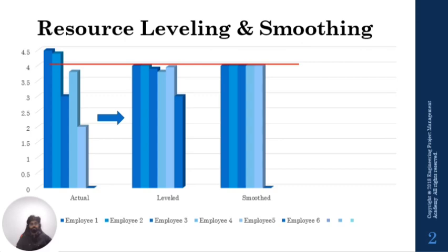To begin with, the best way to avoid resource imbalance in the project is by doing proper scheduling, and before that, a proper work breakdown structure. A good project manager understands the list of all work activities to be done in the project, and based on that he derives a proper effort estimation, and based on this estimation he comes up with a network diagram like a Gantt chart, or with proper critical path planning and so on.